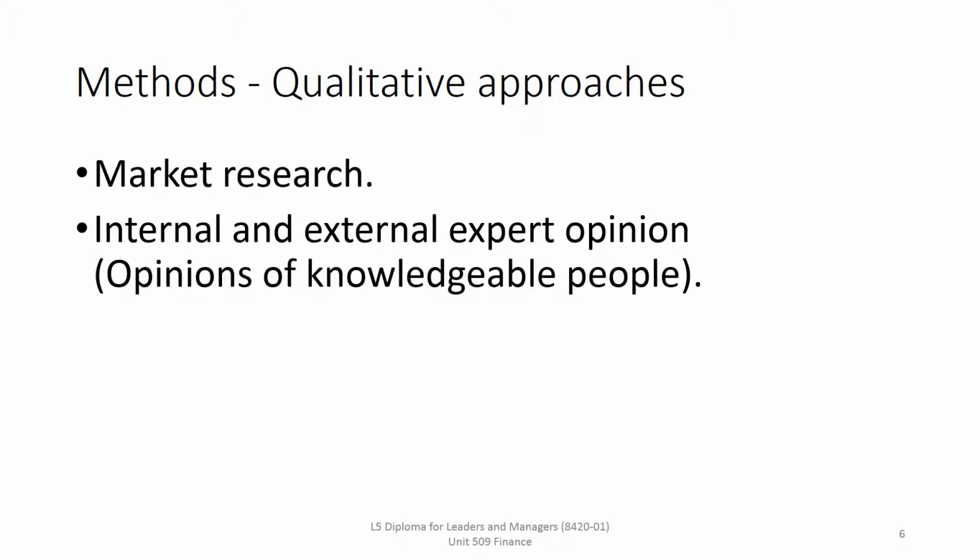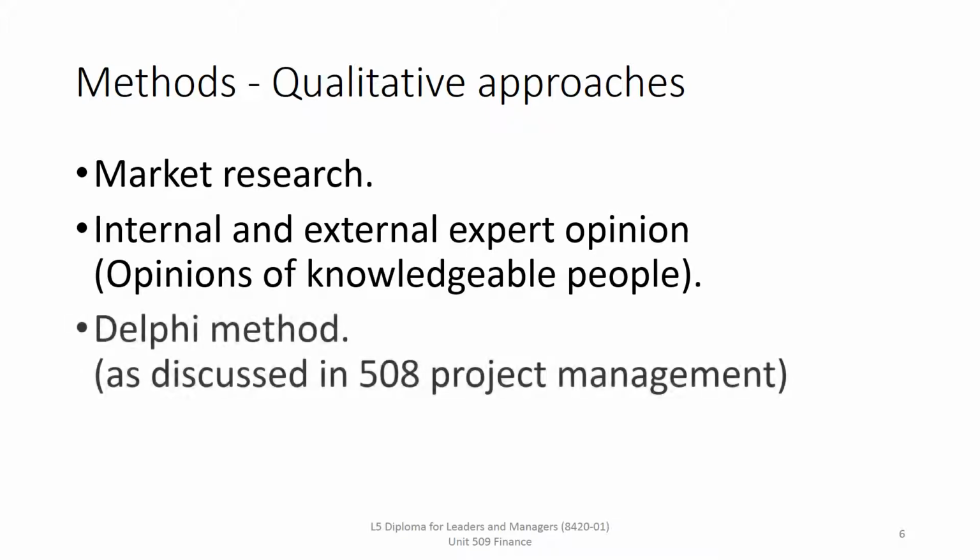And then finally, the Delphi method, as we discussed as one of the project management methods 508, a structured methodology deriving forecasts from a group of experts and then a facilitator using multiple iterations to get them to revise their thoughts. So they're the sorts of approaches that you could use for the qualitative methods.